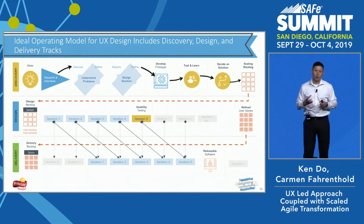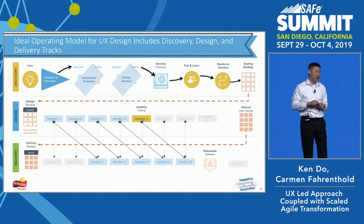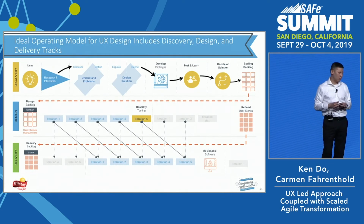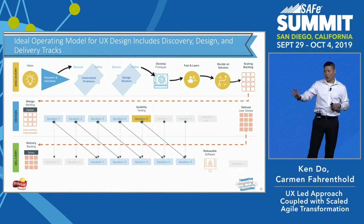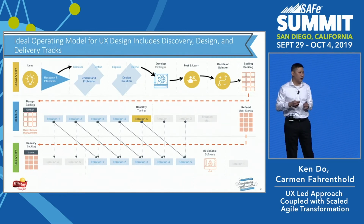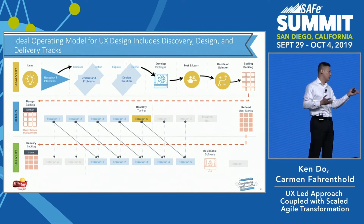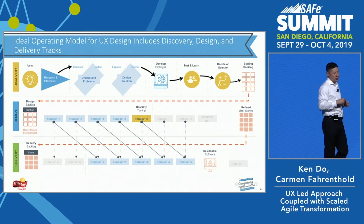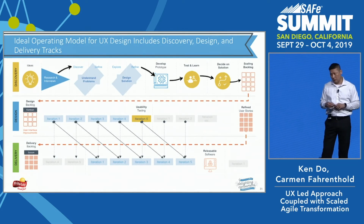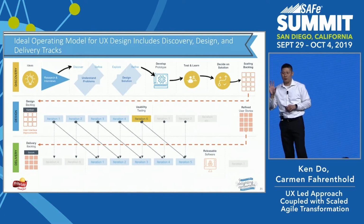At this point, the team will take the work that has been done and quickly execute the user story with the right acceptance criteria, and then take the user story to done. Again, quickly: the 3-track discovery is very high level, 18 months plus out. The discovery track is 6+ months out, and then the delivery is either just in time or the current PI +1, when possible.